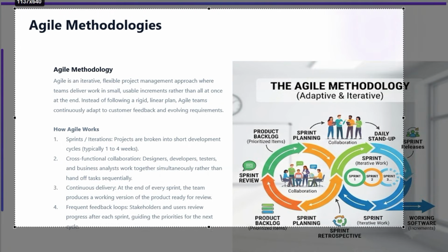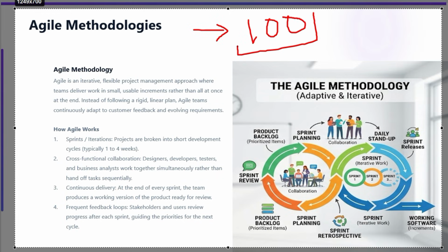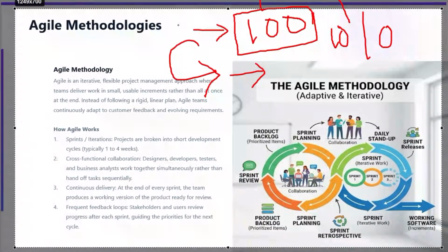Next is the agile methodology, which is an iterative and incremental process. Agile ideally breaks those 100 different features into small brackets or groups of features, and then starts delivering those small groups of features at one go. If we take the same example, Agile is going to break these 100 features, let's say, into 10 each month. In Waterfall, you are delivering all 100 features of the application at the same time. But in Agile, you start delivering 10 features each month.